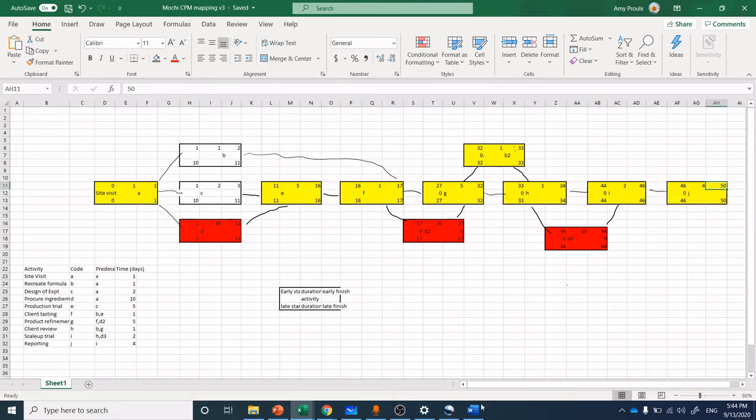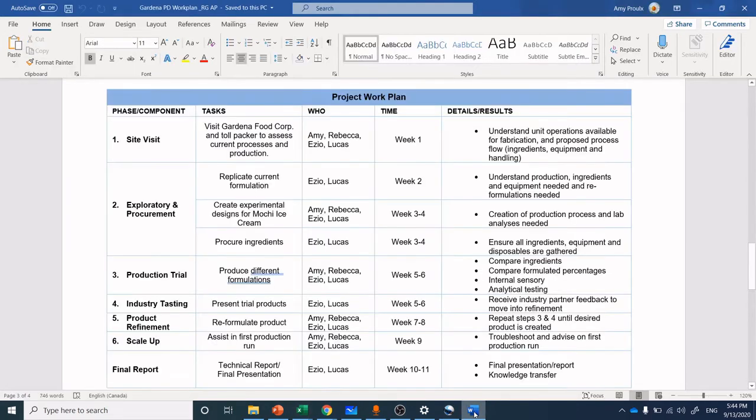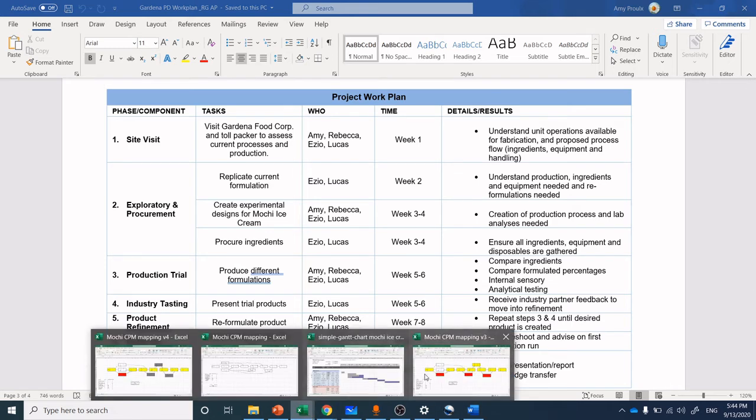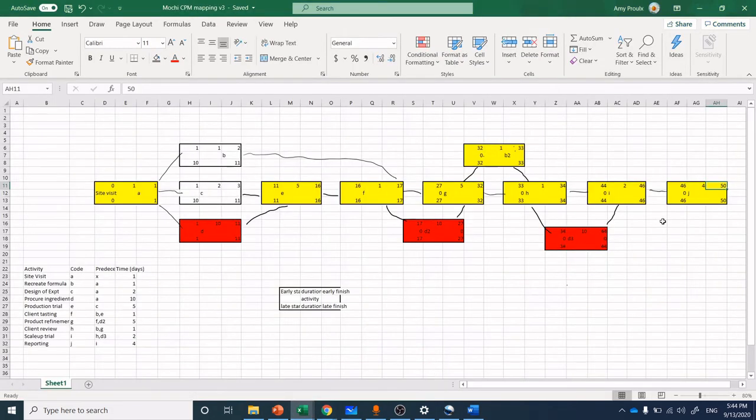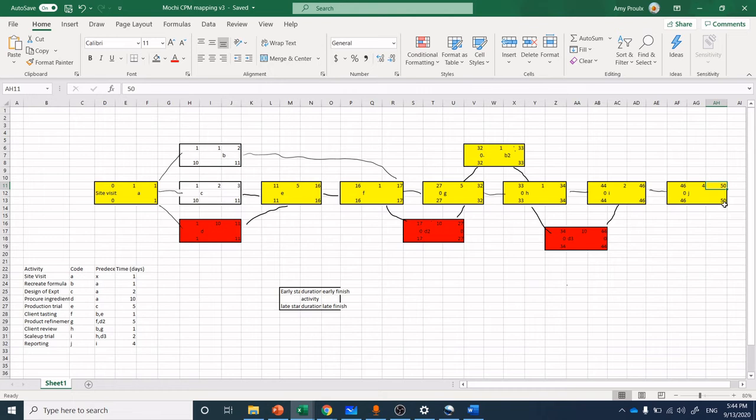Day 44 is our day up here, because we can't go straight from the client tasting to the scale-up trial, because we're making the assumption that we have to go and order the ingredients in bulk. So we need that 10-day lag time. And we're at day 44 plus 2 on our production scale-up. We're at day 46. Day 46 plus 4 for reporting, and we're at day 50. Now, if we go back to our chart here, we said it was going to take us approximately 10 to 11 weeks, and that's approximately correct. Based off of the forward pass here, we are at 10 weeks, which is good job.